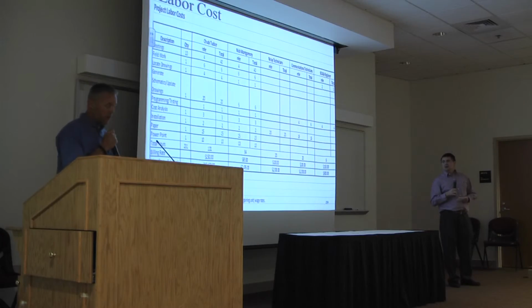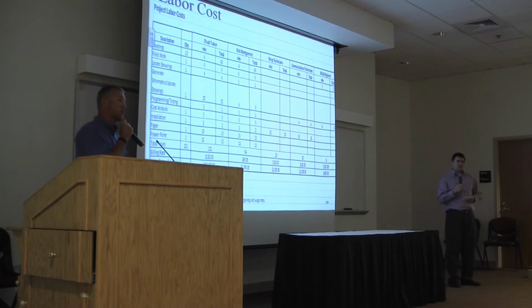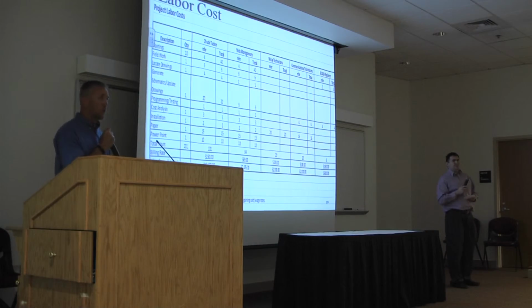On the labor cost, we kept track of Nick and myself's time, as well as all the other labor crafts involved, as well as our SCADA engineer that helped out with the project. And we basically ended up with an engineering/design total of 185 man hours spent for the project. Programming and installation ran in around 46 hours for a total of 231 project hours.